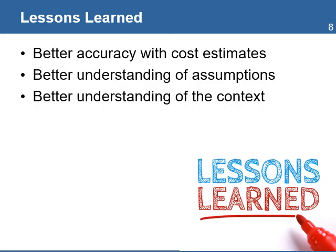The last step in the budget management process is to capture lessons learned. This is useful especially if the lessons can be applied for the remainder of the project activities or to future projects. For example, the initial estimate used to develop the budget may have used wrong assumptions about the cost and time to complete an activity, such as when it takes more than one person to collect beneficiary data or underestimating how poor road conditions increase the cost of vehicle maintenance.